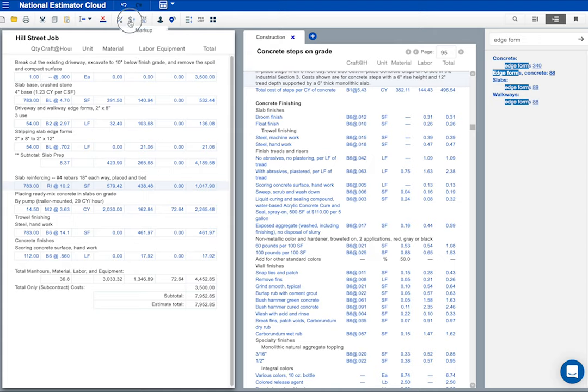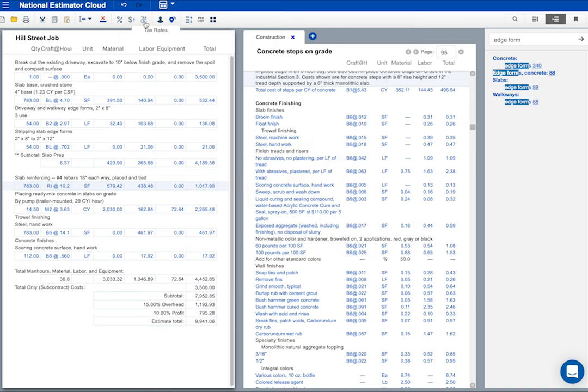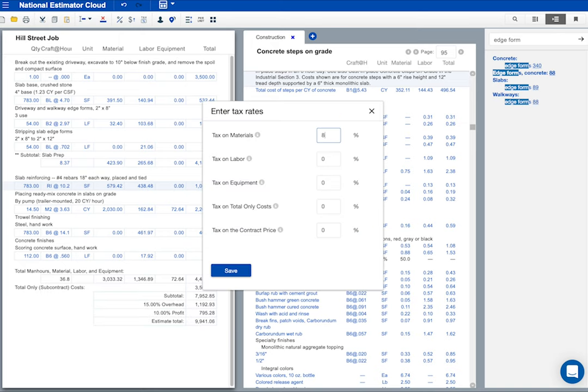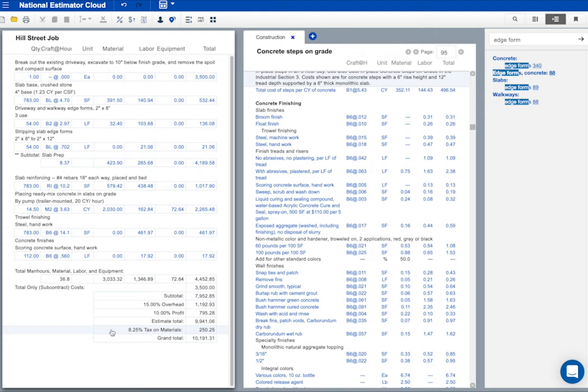Here's the markup button. We've already got markup in this estimate. Tax at this job is eight and a quarter percent. If you pay tax on materials, remember to add tax to your estimate. National estimator cost books don't include tax. Tax shows up right here, just above the grand total, but below the estimate total.